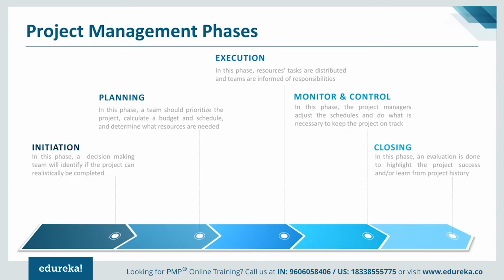Closing. So again, closing is another phase where, typically, we close all the activities that we have been doing. So we do proper handover to the operations team and support team. At the same time, we ensure that vendor contracts, if there are any, are getting closed properly. If the team is there, then we ensure that the team activities, in terms of journaling activities, are happening properly. So all those things will be a part of project closure typically. So these are nothing but the process groups, I would call them mainly initiation, planning, execution, monitoring and controlling,